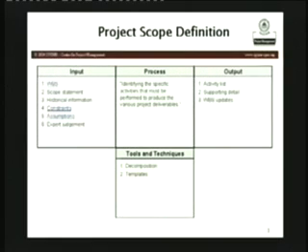Similarly, to define the scope. Now, please remind me again, I keep forgetting things. What is the scope of a project? What do I mean? What is under my consideration? What I'll be doing, what I'll not be doing. Yes, you very clearly lay out, because your estimates, your costs and everything are contingent on what you agree to buy, agree to build. This is something that you commit to. Therefore, it's very important for us to understand these things will be included and these things will not be included. So that defines the scope for me.